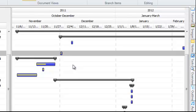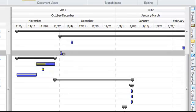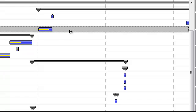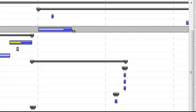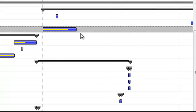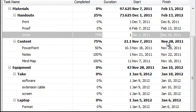You will be able to then see your task information has been populated within your Gantt chart. You have further options here. You can manually increase the task times using the blue bar and the arrow and this will then reflect the data into your task table.